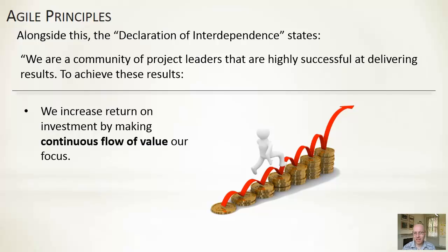And by continuously going back to the client and saying, here, have something else you find valuable, and repeating that, it lets the client see that, okay, I've given you money, and you're not promising me that in 2 years' time you will deliver anything. But every 3-4 weeks, you are showing me something that I actually want to see. That's a very helpful way of cementing the relationship and keeping the client happy, because they know things are moving forward.